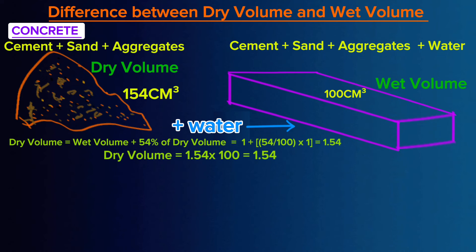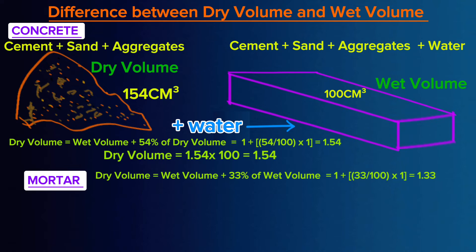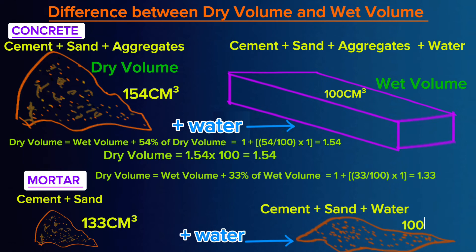Just the same way we have done for concrete, it also applies to mortar. Dry volume here is equal to wet volume plus 33% of wet volume, which can be simplified as 1.33. For example, when you want 100 cubic meters of mortar, which is wet volume, to get dry volume, you simply multiply 100 cubic meters by 1.33 to get 133 cubic meters.